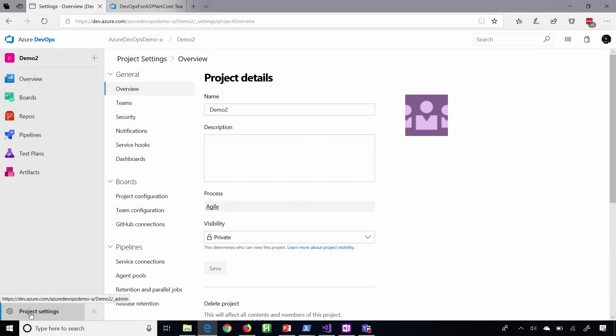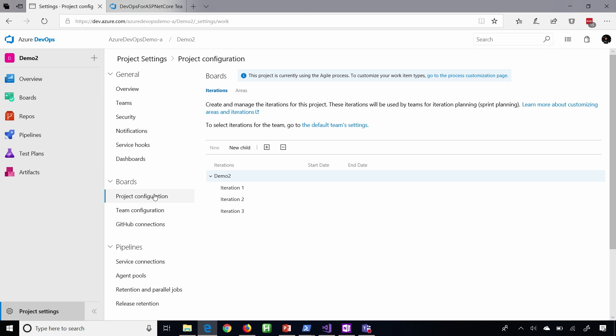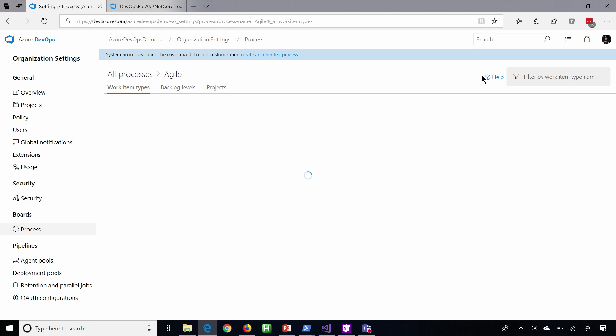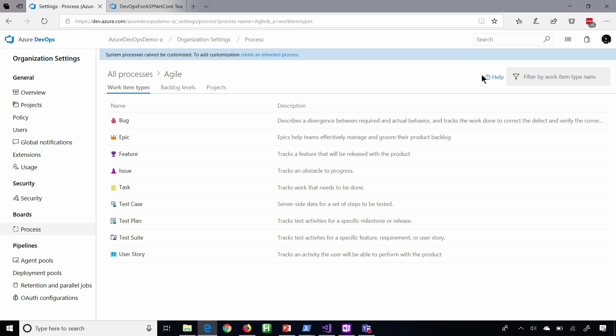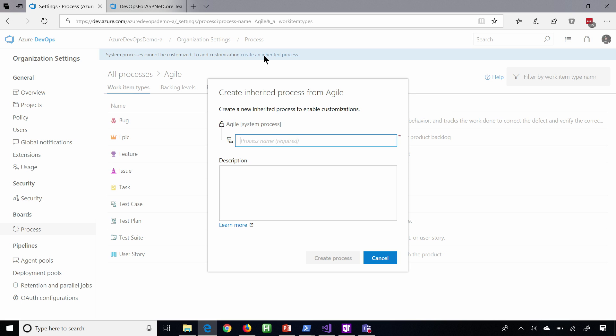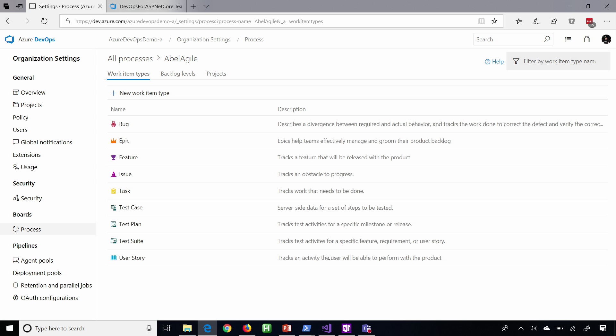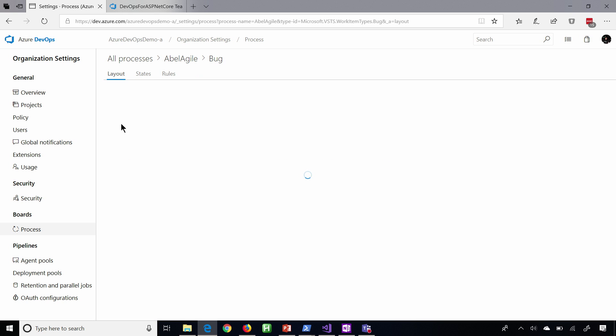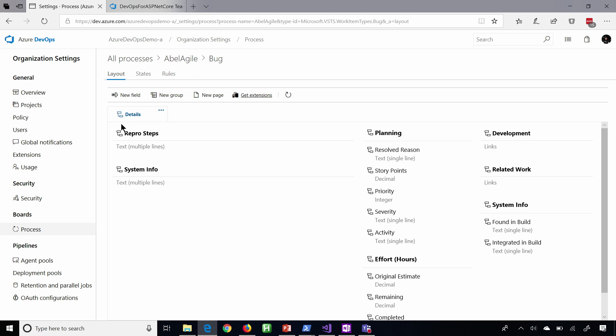And the way that you do that is, let's go ahead and go into Project Settings. And then from Project Settings, go to Project Configuration. And it says, this project is currently using Agile, right? So if we wanted to customize this, we can go ahead and go to the Process Customization page. And it's going to tell us, you can't customize this because this is the Agile template. It's the built-in template for Agile. But what you can do is create an inherited process. Okay. So it will inherit the stuff from Agile, but then now, you'll have the ability to come in here and start modifying it. So we'll call this AbleAgile. So if I want to do this, basically, I'll pick whichever built-in process is closest to the one I want to create. Yes. Let's start with that, and then I can start changing things around. Yep. So now you can add new work item types. You can drill into a specific work item and add and remove fields and change things as well, right? So you can really customize these work item templates so they work in the process that you want them to work. Very nice.